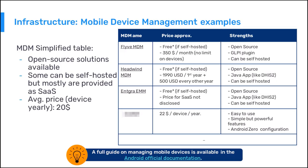This table contains some of the recommended MDMs for DHIS2 mobile implementations. Using one can imply additional costs such as hosting or per-device licensing fees. This is the main reason to evaluate the need and include its costs as early as possible in the project and budget definition. It is important to evaluate different alternatives to find the most adequate for your project. In some cases where you have a strong infrastructure team, you might choose to host the solution on your premises, while in others you might delegate this task to an external company.